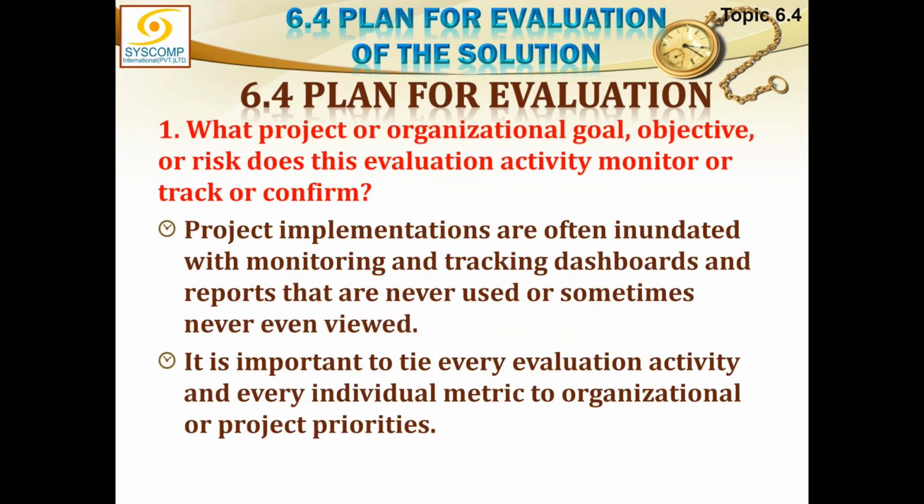Taking them one by one. First was, what project or organizational goal, objective, or risk does this evaluation activity monitor or track or confirm? Project implementations are often inundated with monitoring and tracking dashboards and reports that are never used or sometimes never even viewed. It is important to tie every evaluation activity and every individual metric to organizational or project priorities.